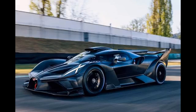Throughout the manufacturing process, LJRC maintains close communication with vendor A to ensure the package meets their expectations, including weight and downforce targets. Upon delivery, LJRC inspects the aerodynamics package and conducts wind tunnel tests to verify the downforce improvement. They approve the package and make the final payment only after successful performance testing.